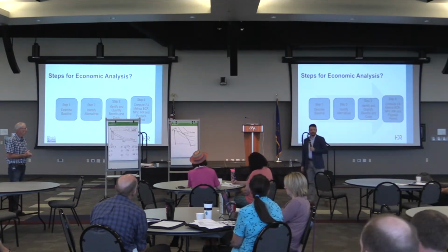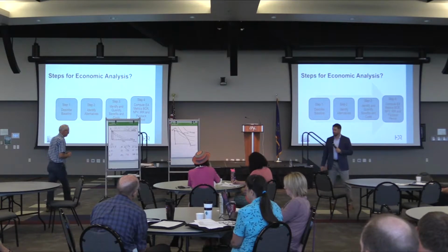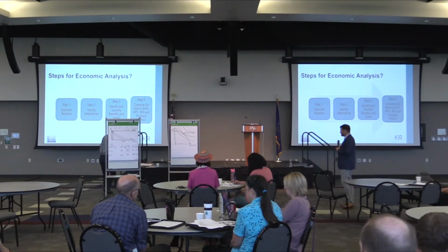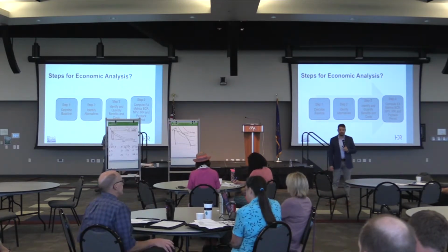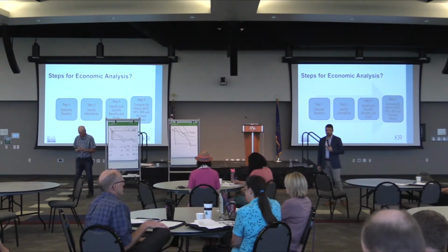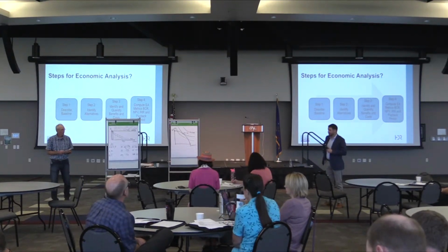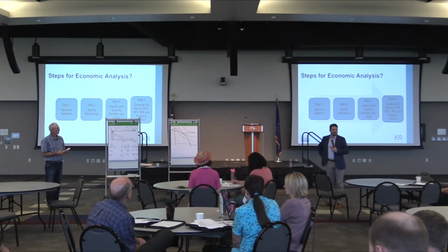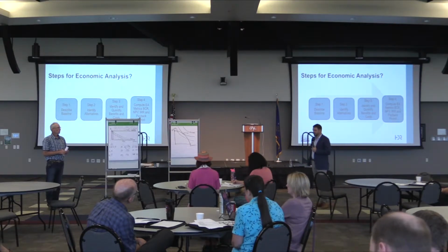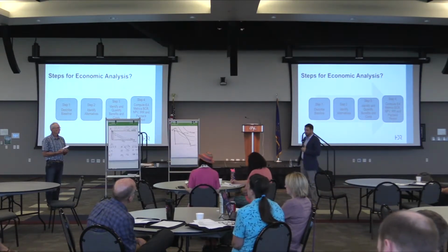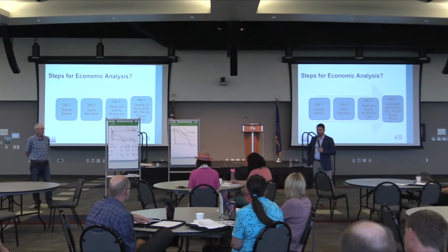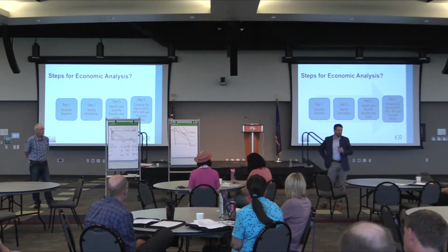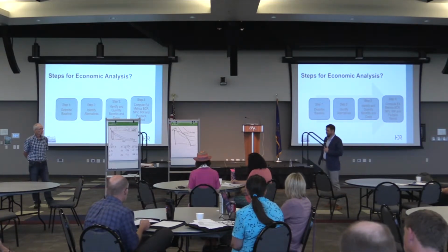So steps for how we do the economic analysis. This really takes from what Jay just covered, thinking about at the margin, discounting, the different ways that we get to benefits in terms of function versus value. So first, what's the baseline? What is the state of the environment today? You know, you have flooding. How much flooding? What does that do in terms of damages? What does that do in terms of value? Going out and assessing that and inventorying what your baseline condition is.